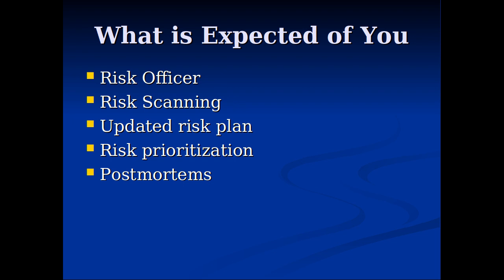And as I noted, I expect a risk officer, risk scanning, and an updated risk plan. For each deliverable, ID 1, 2, 3, 4, 5, I'd like to see a risk plan. I'd like to see, what are the top 10 risks right now? What's a risk that might change later in the semester? What's a risk that might go down later in the semester, typically?